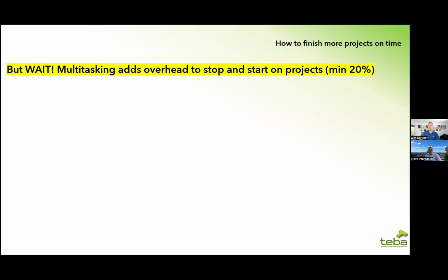So hang on a second, is that how the real world works? Well, when we do multitasking, if you start something and you don't finish it, and then you need to come back to it, does it take the same amount of time to finish? Of course not. There's always an overhead to restarting something. You've got to remember what you're up to, log into the right systems, depending on what you're doing. As a minimum, that adds 20% to any restart tasks.